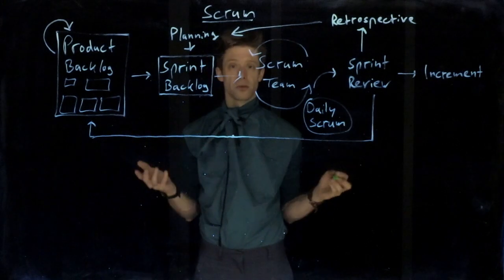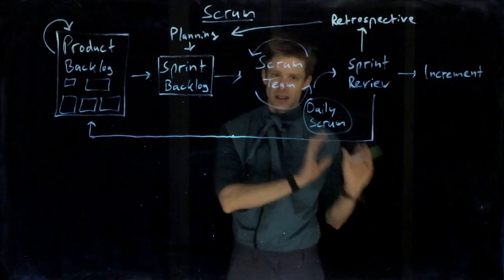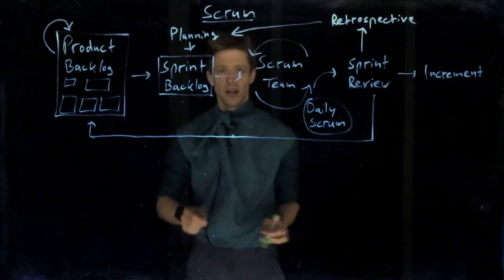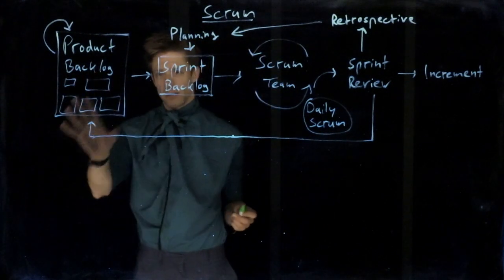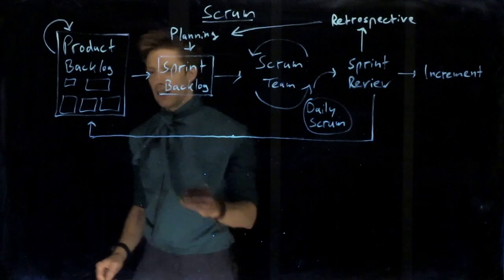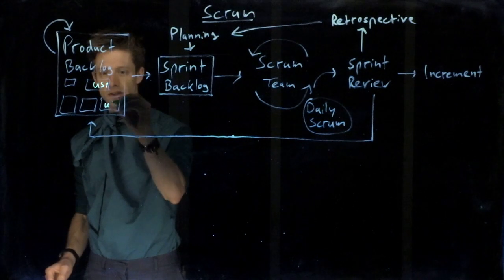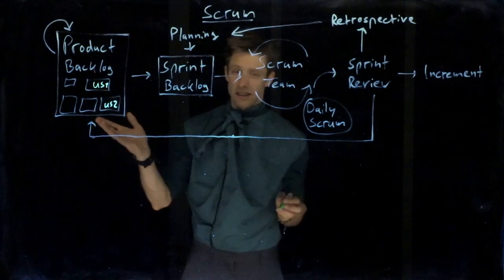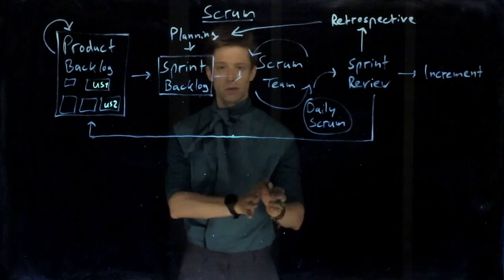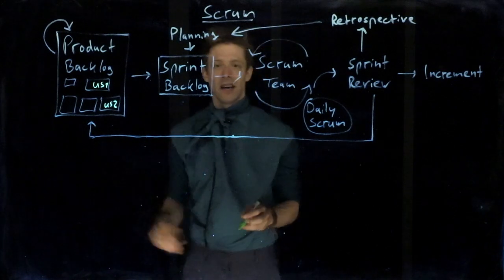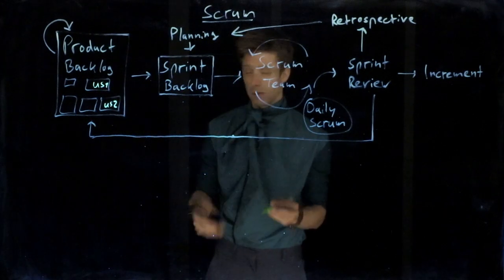Here you see the figure that describes the Scrum process, and I will just walk you through the different steps, the different deliverables, and the different people that are involved. We start here on the left side with what is called the Product Backlog. The Product Backlog is a collection of typically user stories. As you learned in the requirements lectures, they are typically formulated in the way that you say, as a user, I want to be able to, then you have a functionality, and then in order to, and you get the benefits.